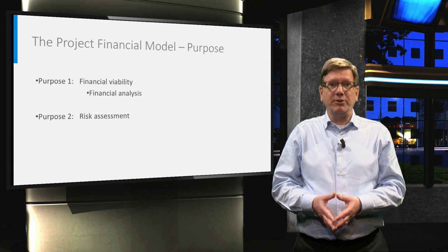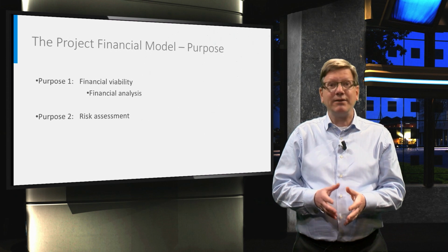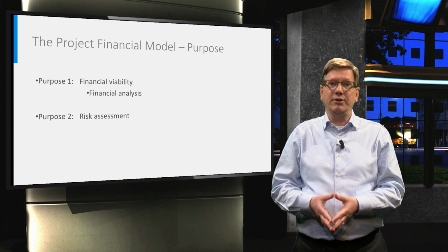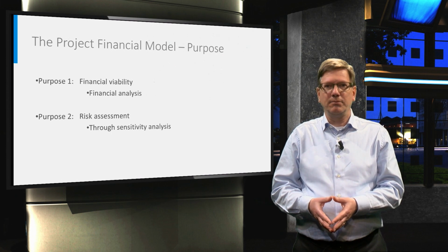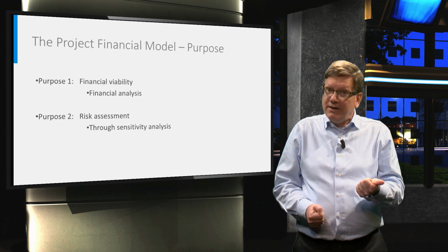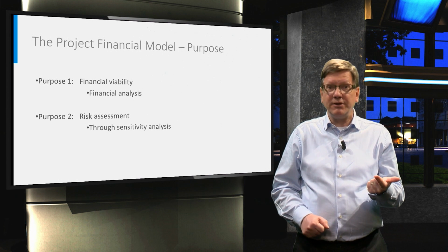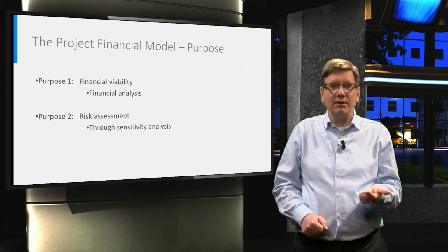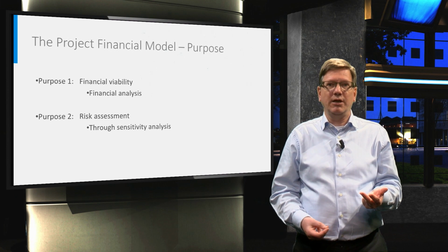An additional purpose of the model is that it enables stakeholders to analyze the impact of changes that could happen in the project. And this is called sensitivity analysis. Such analysis is important to determine the feasibility of the project, as a tool in the process of risk assessment and risk allocation, and because it's a useful tool in contract negotiations.